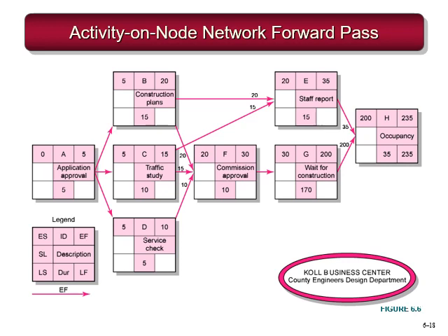Now activity A, because it is the first activity, it doesn't have any predecessor. It starts from day 0, and it has a duration of 5. So the early finish of activity A is 0 plus 5, which will give you 5. This 5 will carry on here.